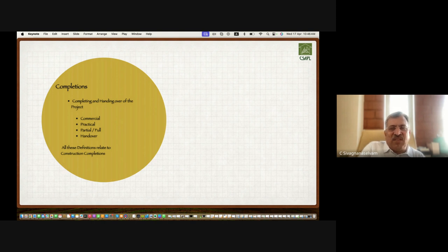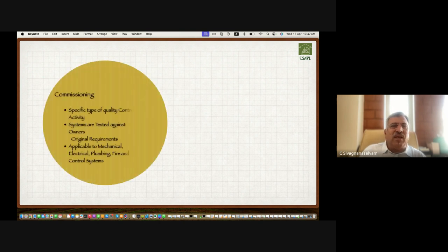So the commercial is the first thing. That is, if they have some trading activity, the trading activity will be inaugurated first or completed and commissioned first. Then practical. Practical in the sense, the part of the industry, which the core industry may not be started, so the entire park will not be inaugurated, but certain activities which need to cooperate with the trading can be completed at the second phase, and partial, full, and then you are handing over. So this means that on a phase-wise basis you are completing, giving it, and at the last you are going to commission it. But all these definitions relate to construction completions, because completion of a project is the most important thing, and commissioning is